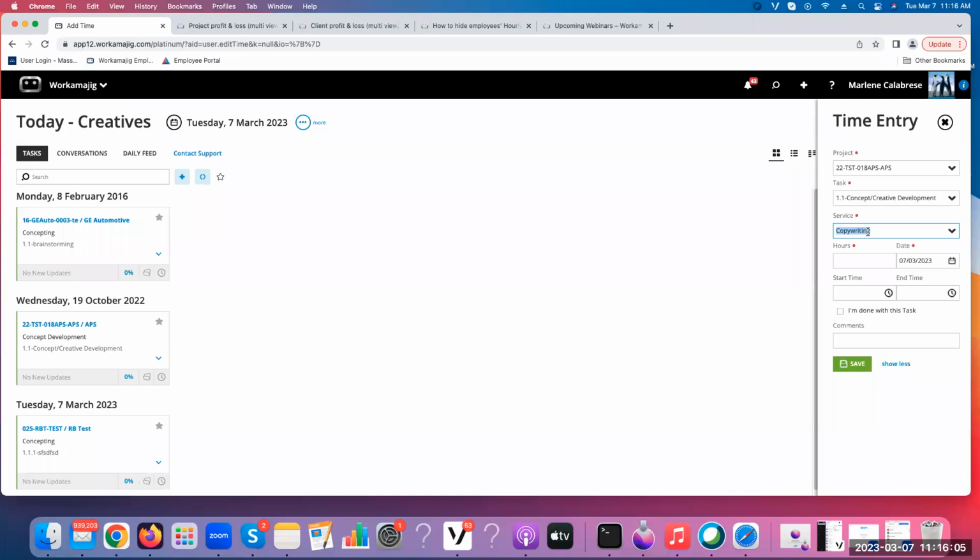especially if you create your estimate in Workamajig by pulling from your project schedule. That's really the Workamajig way, when you have a bunch of estimated hours in your project schedule for your tasks, and you've picked the service that you want and it's associated with a dollar amount. If we use the pull from schedule feature with that to create our budget, which is the approved estimate, everything is going to match up. And then we're going to be able to see the actuals compared against a more accurate budget.